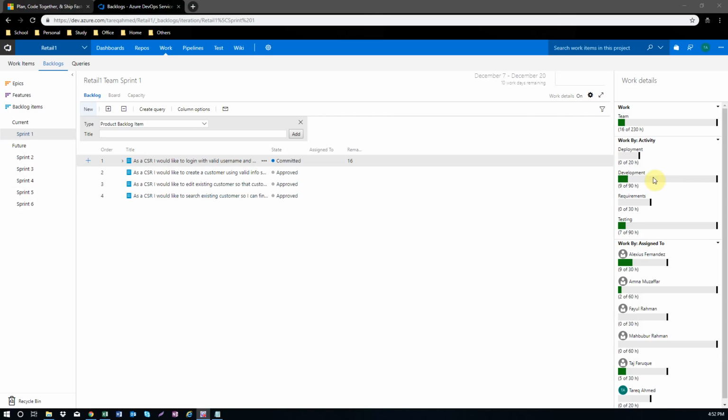So this is called a burn down. Every day a team should burn 23 hours. If you burn 23 hours of work on a daily basis, then by the end of 10 days all 230 hours of work will be done. So you have a team capacity of 230 hours, and you have to burn all of it in 10 days.